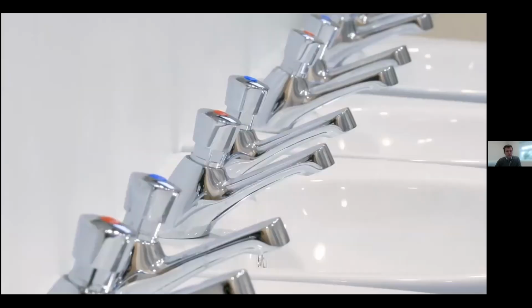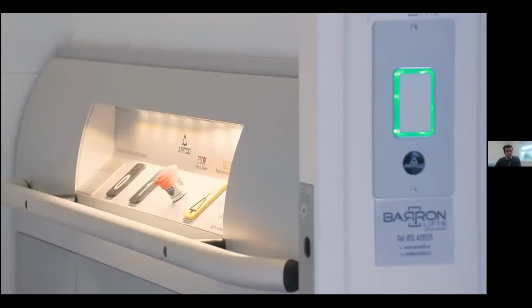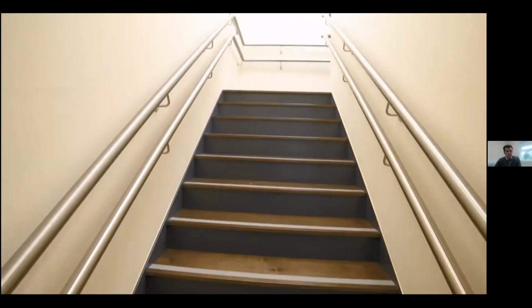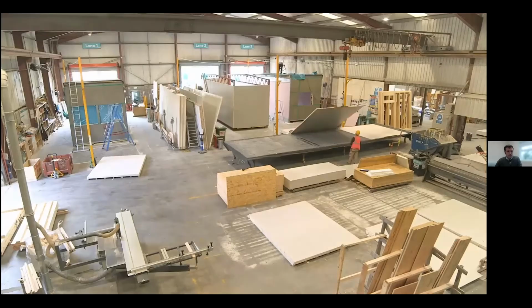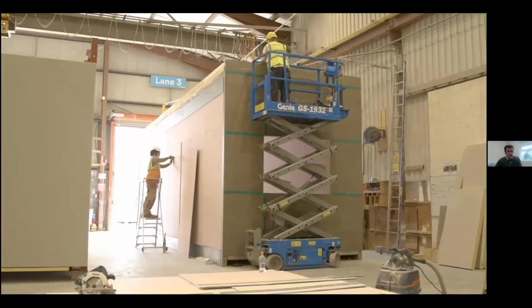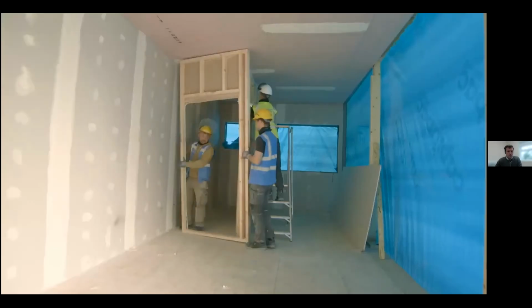It is very much a permanent building that way, and it's fully accessible, complies with its own disability access certificate. We were assigned certifiers for the project, so we had to coordinate the certification, and part of that is the building inspections. We were able to accommodate Peter's team coming to the factory to view the build, so any changes were easy to do off-site rather than on-site. Several off-site inspections at Cpac's workshop. We could see the full frame of the building at various stages. We could inspect each element.